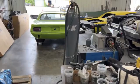of the chassis, 3 weeks; engine and drivetrain assembly and testing, 2 weeks; aerodynamic optimization, 1 week; test runs and performance tuning, ongoing. Each task will have a designated owner, for example, lead engineer, and a clear due date. A RACI chart will be linked within the project plan, outlining roles: design engineer, fabrication crew lead; accountabilities, ensuring design meets performance requirements, quality welds; consultations, project manager for resource allocation; and informs team owner about critical issues.